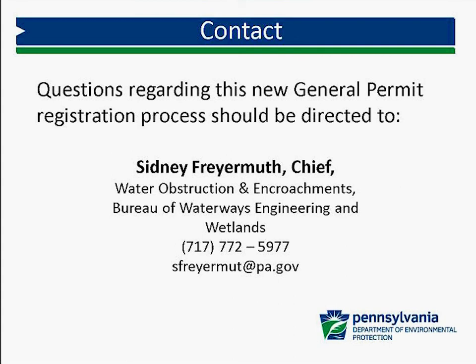Will you hold the authorization until the Conservation District has approved the E&S plan? The E&S plan is a separate authorization by the County Conservation District. If we acknowledge your general permit at the DEP, you're informed in that process that you need approval of your E&S plan.